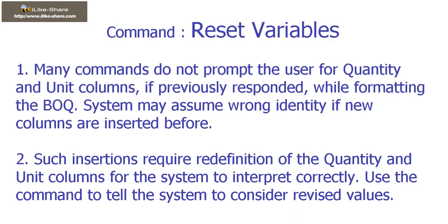Many commands do not prompt the user for quantity and unit columns, if previously responded, while formatting the BOQ. System may assume wrong identity if new columns are inserted before. Such insertions require redefinition of the quantity and unit columns for the system to interpret correctly. Use the command to tell the system to consider revised values.